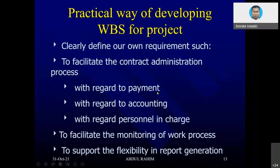A practical way to develop WBS is to clearly define requirements to facilitate the contract administration process, especially tracking the payment system. Some companies in other countries have an accounting system with a coding system so they can trace and group activities by category very easily — to facilitate monitoring of work progress.